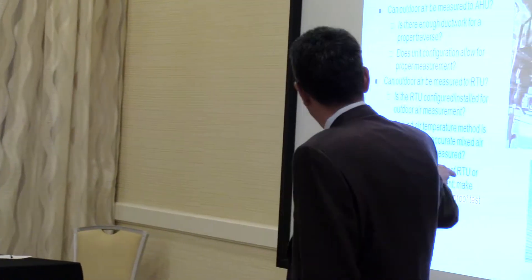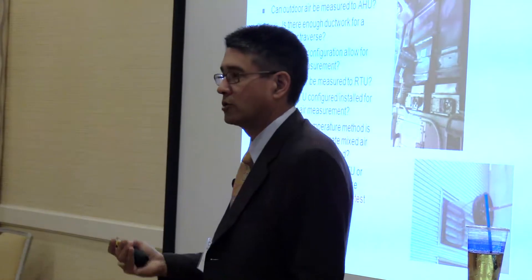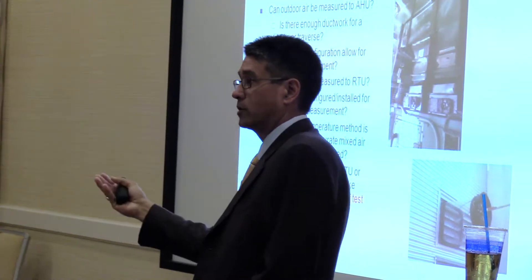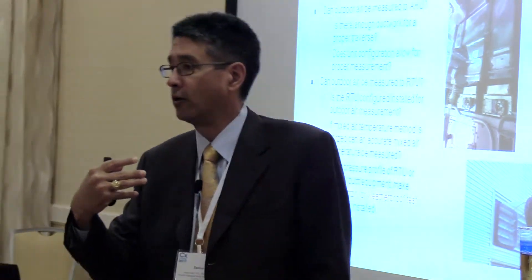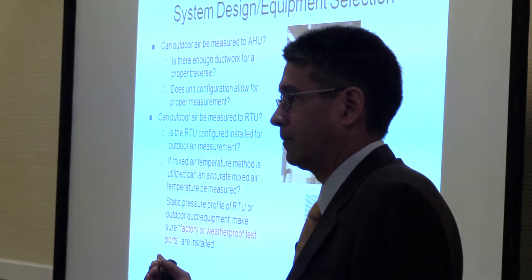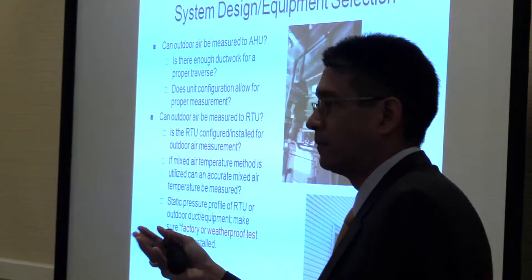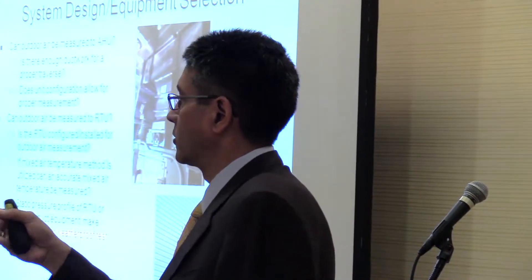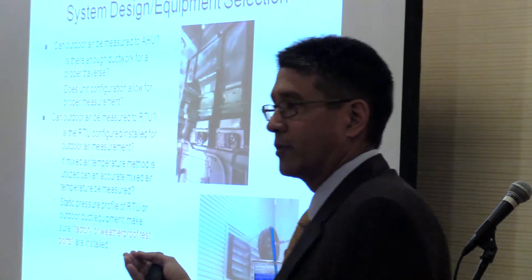You can't put the flow hood on the back end of a rooftop unit and get an accurate measurement. Start asking: am I going to get a mixed air temperature measurement? Are there test ports installed in the right spots on the rooftop unit? I do not like to field-drill a rooftop unit, so the key thing is making sure the manufacturer provides test ports — vent locks or something in that neighborhood — so you can get your measurements across for static pressure profiles or temperature measurements.